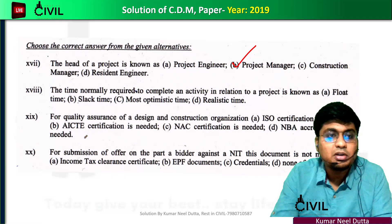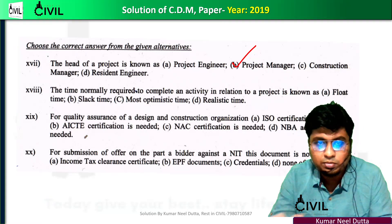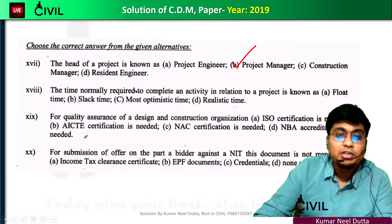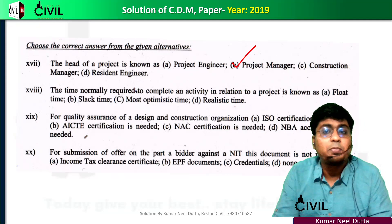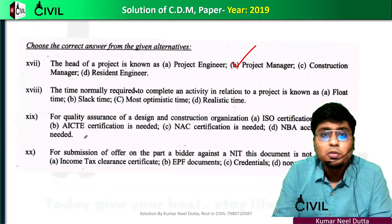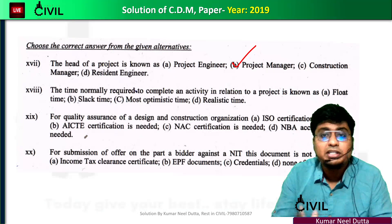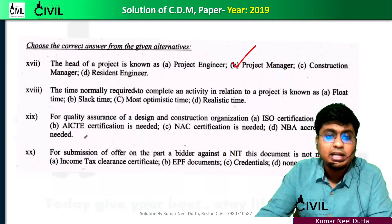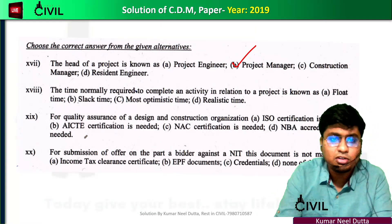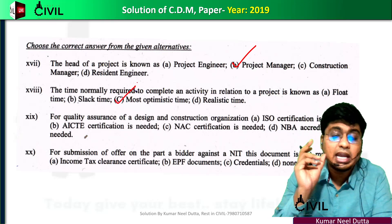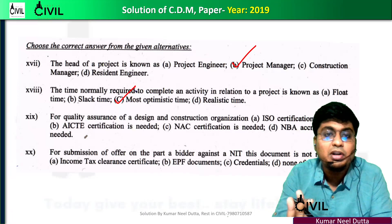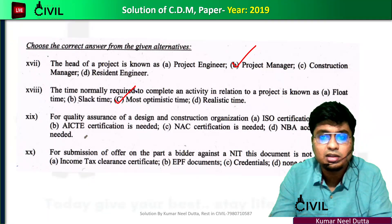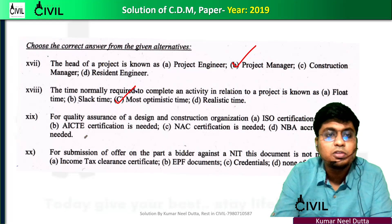Question: the time normally required to complete an activity in a project is known as what? Float and slack relate to delays. The most optimistic time is the time under ideal conditions — the best possible time. The pessimistic time is the worst-case, highest time estimate. These are key PERT time estimates.